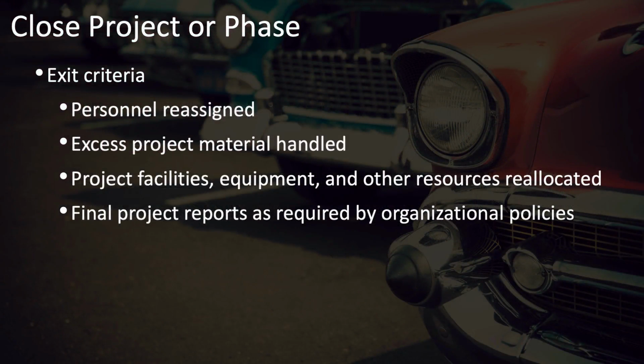Also, at the end of your project, you'll need to make sure that personnel have been properly and smoothly reassigned back to the original functional groups or to other projects as needed. That if you have any excess materials left over from your project, that those aren't just left around, but that those are properly handled, disposed of, inventoried, or what have you.